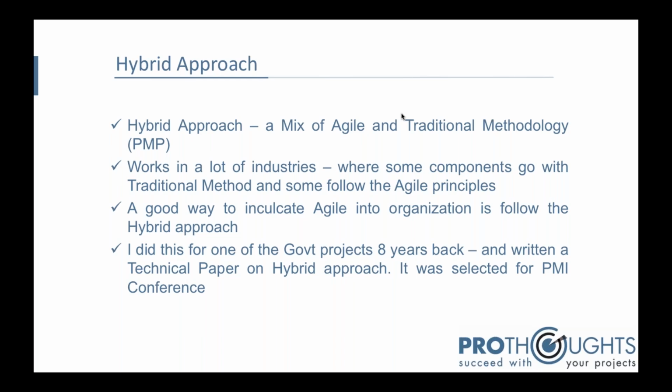But for the compliance things in the pharma industry, they followed the traditional method, because in a compliance project you need to complete the entire work and submit it. If I had done it in agile, I would have done it in lesser time, because I would have avoided the rework: I would have done small bits, and therefore the testing period would have been lesser.